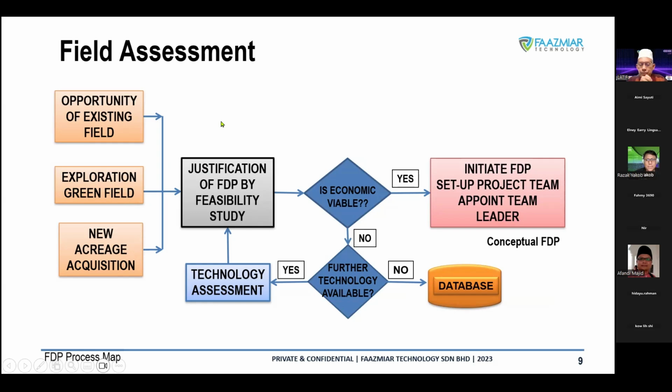For example, once you drill one exploration well, then you start to make some judgment. Say, before you go for appraisal drilling, one well is about 50 to 60 million for the appraisal well. So if you want to drill 2 wells, it will be 100 million. So before doing that, sometimes you do some feasibility study to understand the potential before you start with your appraisal.